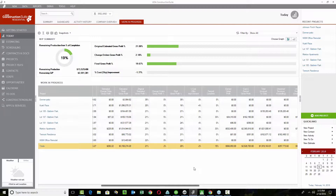This number is a great indicator of how accurate your estimating is. If you're ever halfway through a job and this number is already getting out of control, it needs time and attention. Maybe you need another sit-down with a project manager or site super to rein in what's going on, or maybe we drill into it and figure out if the bookkeeping side is getting a little overzealous with entering all the bills. Either way, it tells you that we need to pay more attention.